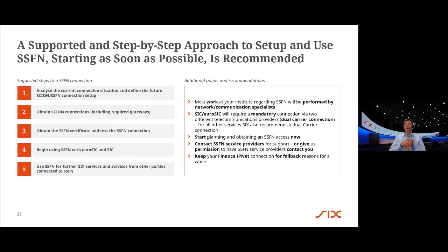It's not actually the application specialists who will be involved very heavily here, but it's really the network specialists who will have the main workload. The application specialists will most probably only come in a 2nd step, when we're actually connecting individual services via SSFN, where they provide the necessary input.